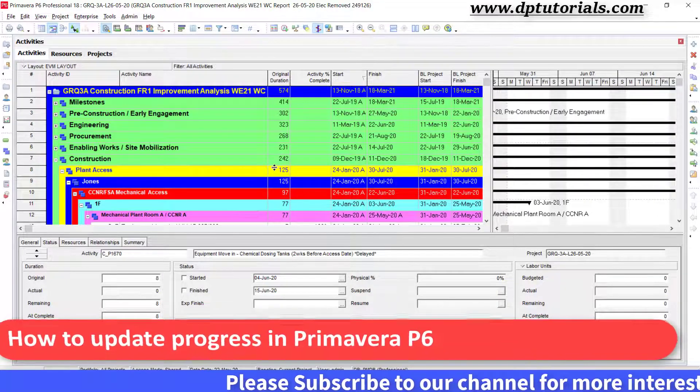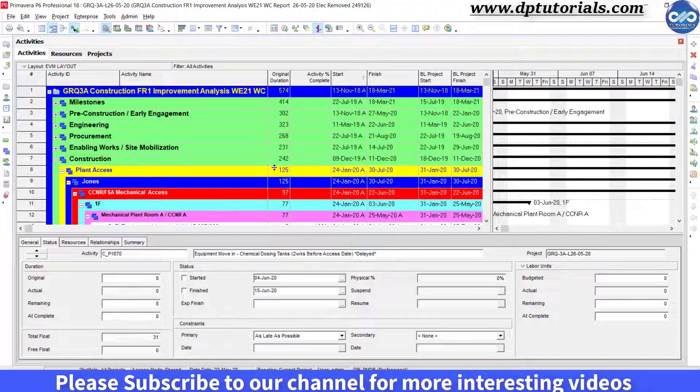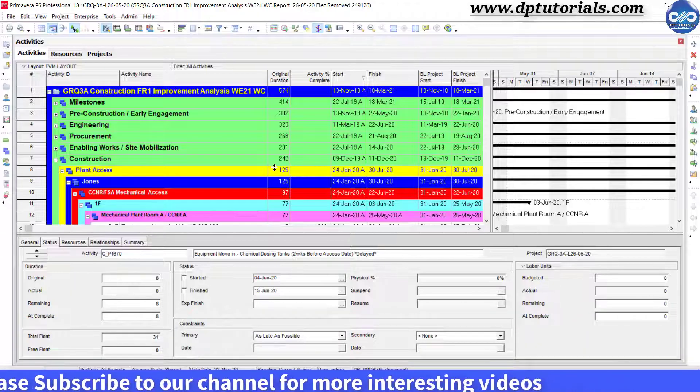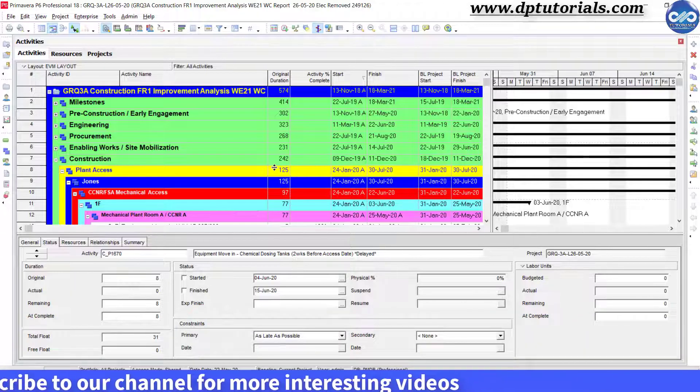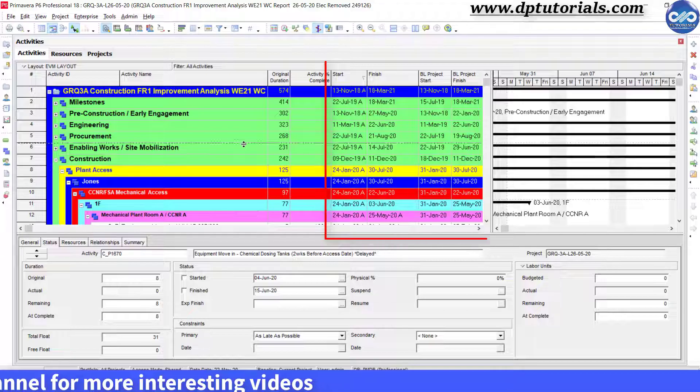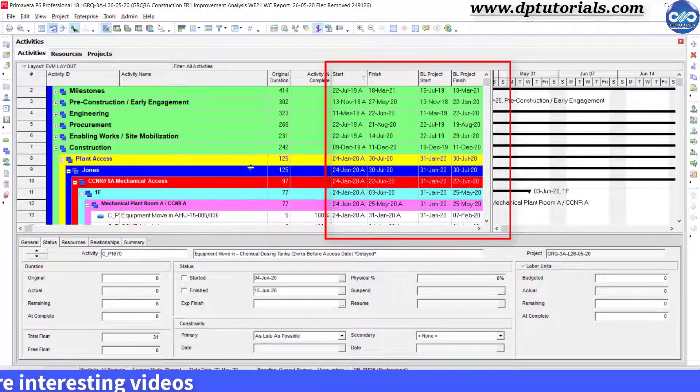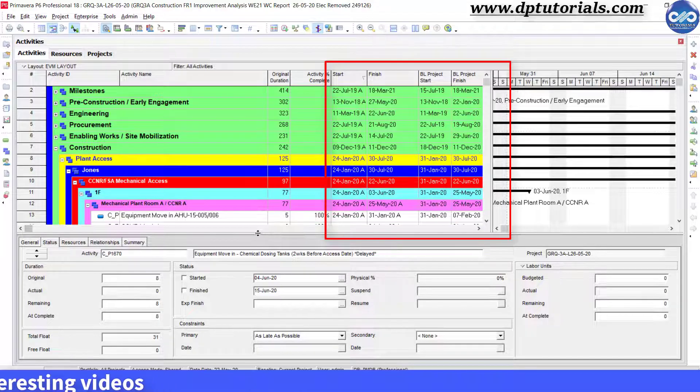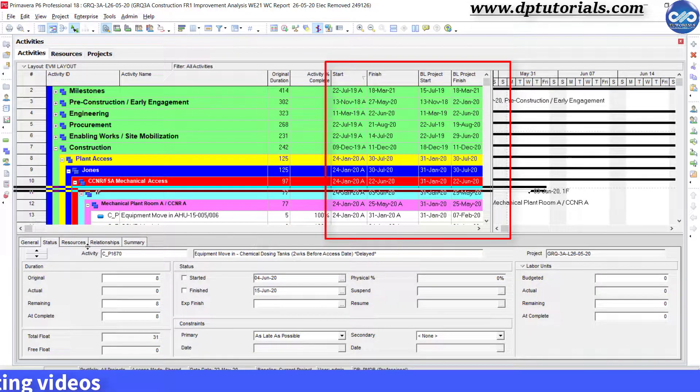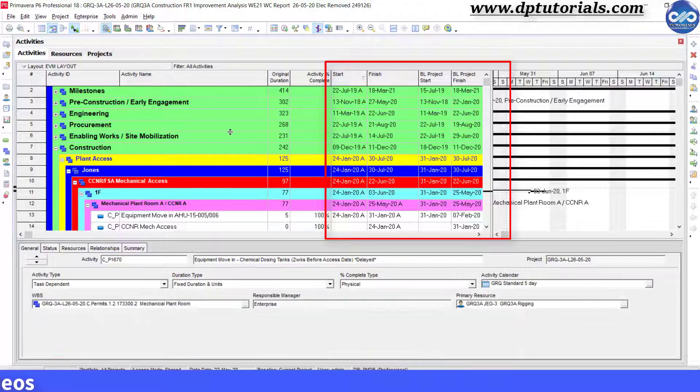So let us open a sample project and set the layout to show like this with four compulsory columns: start, finish, baseline start, and baseline finish.